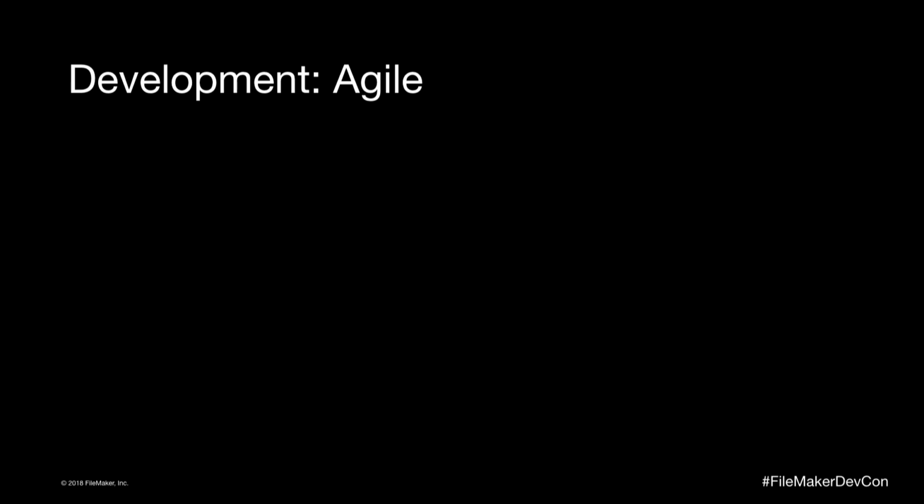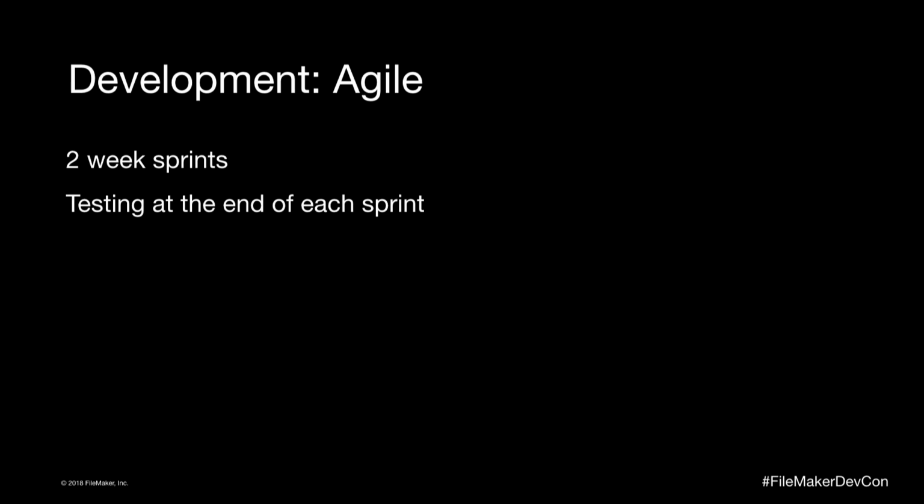The other thing with Agile is how do we make this work for us in the best, optimal way? I want to spend a little bit of time talking about that. Within Agile, it's typical that you'll run two-week sprints, and you'll scope out the amount of work that you're going to tackle in those two weeks. Everybody agrees to that, and at the end, you're able to deliver your module to the client fully tested so that they can have it and then test it. You can change your frequency, but typically what works best is two weeks.